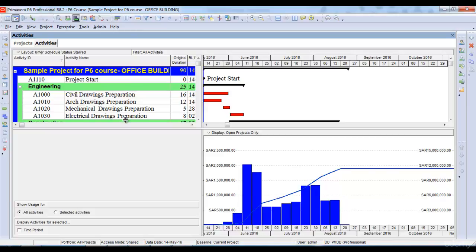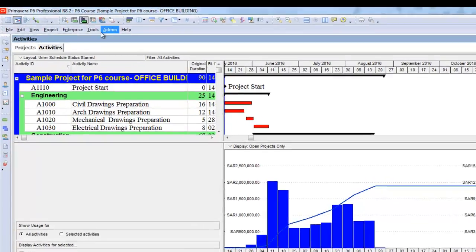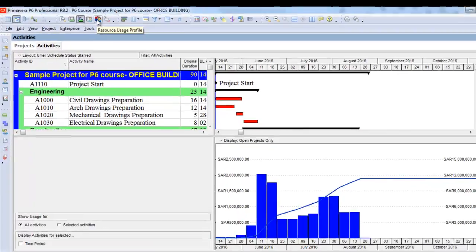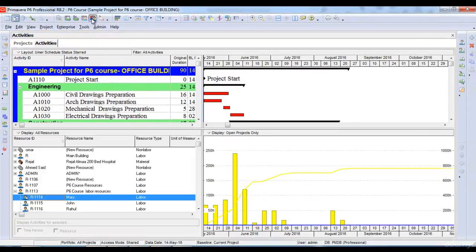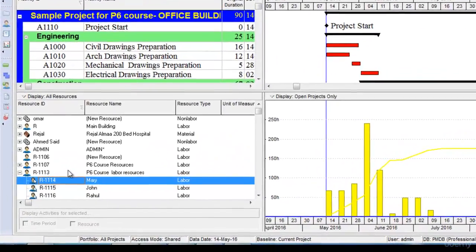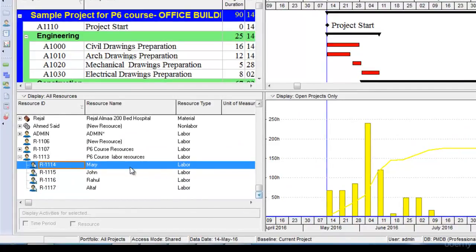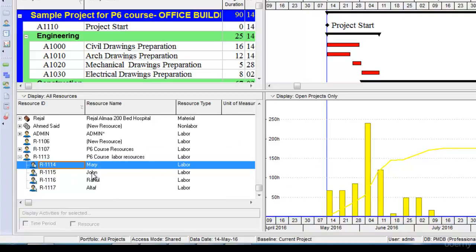In order to look at the resources of my project and how resources are assigned, how many units of resources are assigned per week for the project, I will go to the resource usage profile option here. Once I click resource usage profile option, it opens another graph of the resources. As I know, I have assigned resources to my project: Mary, John, Rahul, and Altaf. If I want to see their assignments, I will highlight the resource I want to see, let's say John.